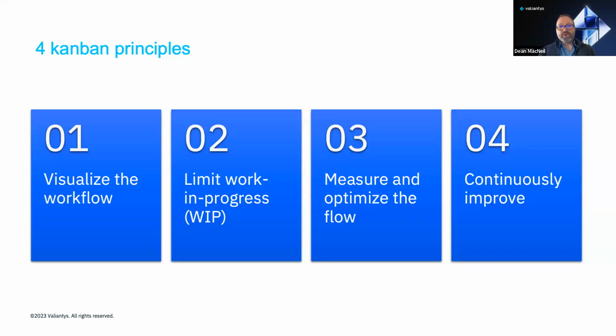There are 4 key Kanban principles. Visualize the workflow, limit work in progress, measure and optimize the flow, and continuously improve.